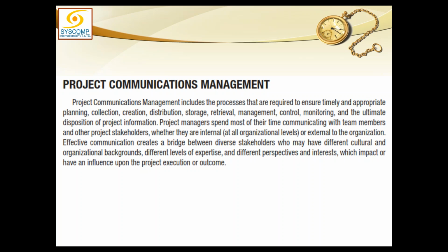So for better communication, there must be more documentation, there must be more record, and the record could be kept in written format. To curb the tendency of having more verbal communication, we are trying to enforce more written communication. And written communication, therefore, should be more than 50%. That is, at least 55% of the project work should be properly documented and in written format. Remaining 45% can be verbal. We cannot completely eliminate the verbal aspect. Therefore, we have tried that at least 55% of the communication should be written.